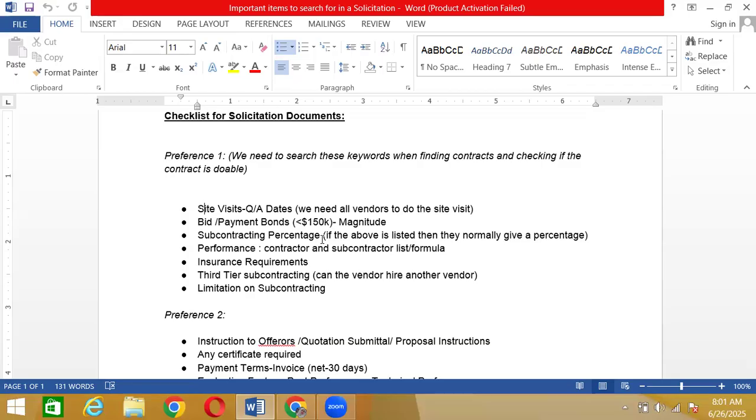Now in this case, I would not throw away the other vendors. I would ask them, okay, you can give me a price based on the pictures. That's great. Take a quote from them as well. Why? Because then we can compare that quote with the person that actually went there, in order to negotiate it. But we're not going to use the person that is giving the quote based on the pictures.